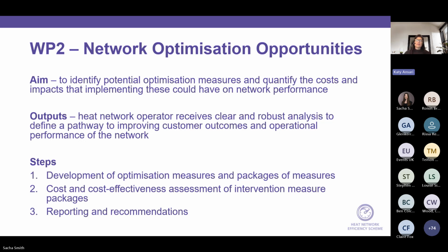Within this, it'll expand on reporting and recommendations. We do ask in this part for the baseline data and optimization measure results to be put in a table to reflect the reductions, for example, in carbon emissions, heat losses, things like that. Any of the baseline data you'd gathered previously, we want to see this against the measures installed. So if this measure is installed, what will be the benefit of this happening? We do need a breakdown of the KPIs for that as well.